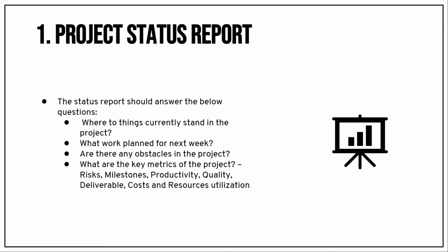For this triangle, what is the current status? Is it green, amber, or red? This itself provides the current picture to the higher management and the client. When we mention that on the delivery side we are in red, the first question they ask is what happened to our release plan. Are we facing any problem? Please concentrate on that first. So the attention will go to everyone on this status.